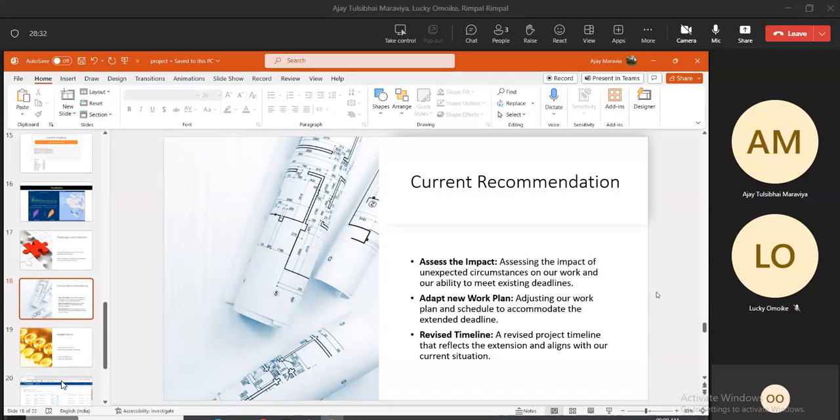Next slide, please. And for our budgeted hours, for the entirety of the project, we expected that we will spend about 68 hours. This basically includes the hours we spend on our meetings, the hours we spend on our visualization, and I'm sure some of these hours our programmer used it to run the programming that you just saw. And then we estimated about $2,040 for the whole project.